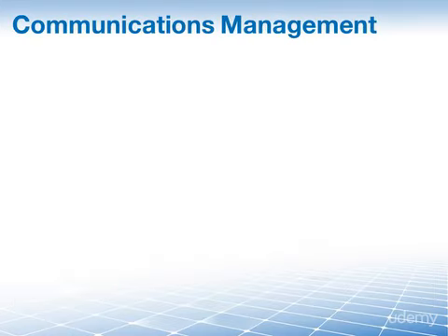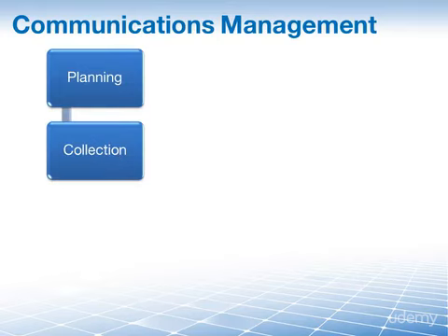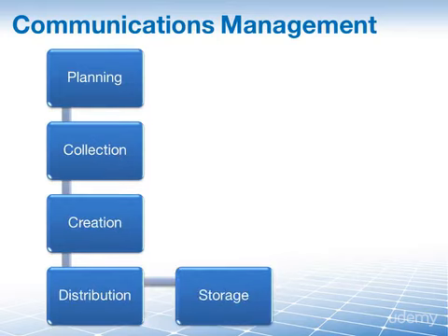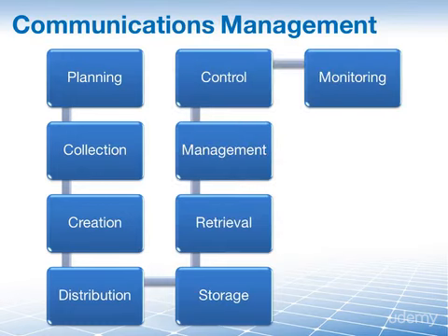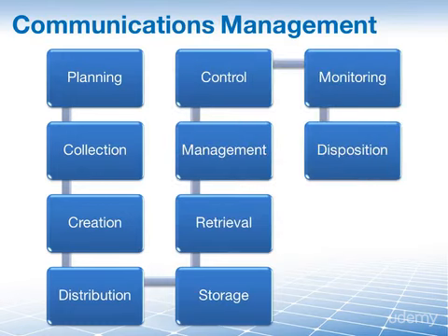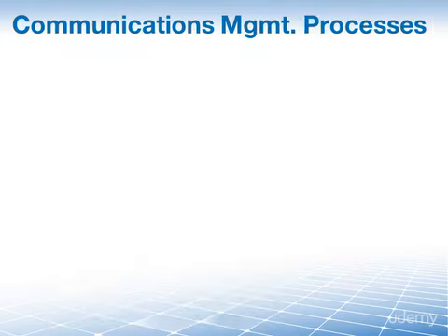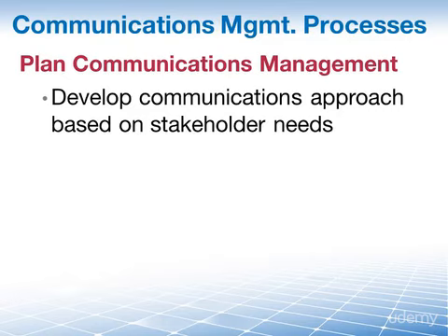The project communications management knowledge area includes the processes that are required to ensure timely and appropriate planning, collection, creation, distribution, storage, retrieval, management, control, monitoring, and the ultimate disposition of project information. But interesting enough, to help us with all of that, we have just 3 processes. They are, first of all, plan communications management, the process of developing an appropriate approach and plan for project communications based on stakeholder information needs and requirements and available organizational assets.